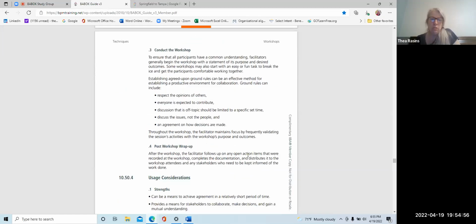Okay. Once you go through the workshop and you have achieved the goals for each of your sessions, at the end of each session, have the scribe identify if you achieved the goal, and what the action items are that came out of that. Anytime there's an action item, again, use the RACI, R-A-C-I, and identify who's responsible for it, when it is going to be turned in, what format it is going to be received in, and who else is going to be involved in it using the roles in the RACI.